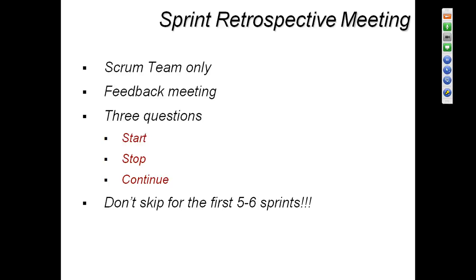Sprint retrospective. At the end of the sprint, the whole team will be conducting a sprint retrospective meeting. The major intention of this meeting is to look at which activities we performed during the whole sprint. What went wrong, what went so well, and in which areas we have to improve. By considering these three factors, you will be conducting a sprint retrospective meeting at the end of every sprint.